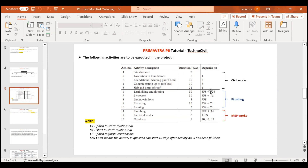Now coming to lag. The plus 10D notation represents your lag. What is lag? Suppose if you have to relate any activity with concreting — after completion of concreting, you will have to cure the concrete. So if any activity has to start after finishing of concrete, it will not be directly related to concreting. Instead, it will have a one-day or two-day lag based upon the curing time, since curing is a supportive activity to concreting. So here, 5FS plus 10-day lag means it is related to slab and beam of the roof as a predecessor, but starting after 10 days of the completion. Your earth filling and flooring will start after 10 days of finishing of slab and beam of roof.